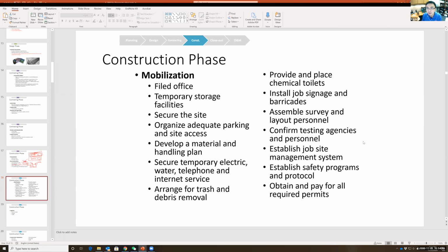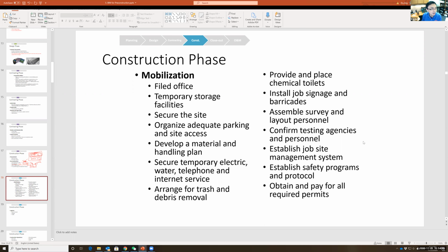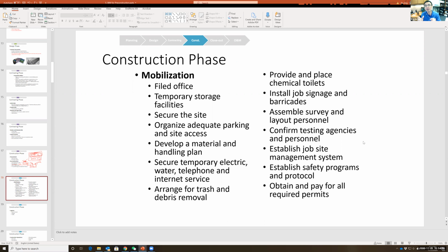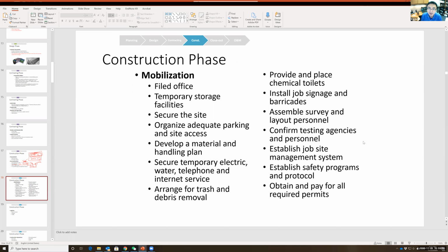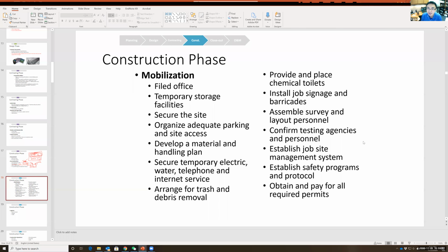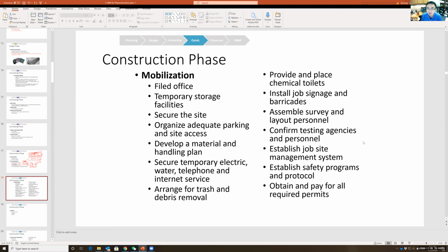By the way, talking about my previous company, Zachary again. They were building a power plant in Cape Canaveral, and it's an 8-acre project. So the power plant takes about 8 acres. And do you know how many buses they have daily just for the commuting between the parking lots and the job site? They actually have about 30 buses, 30 shuttles to move their workers and staff members from the parking lot to the job site.